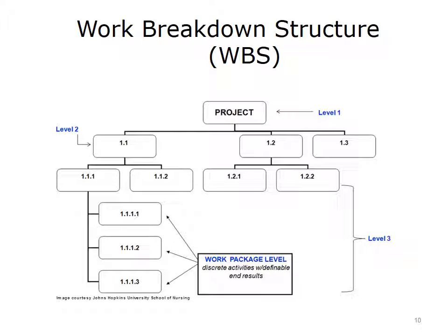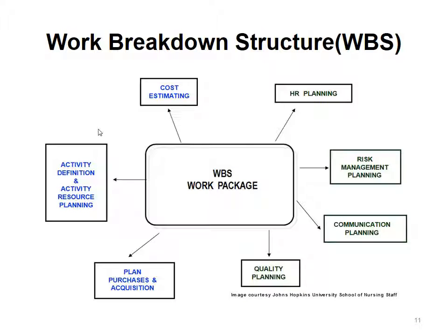The WBS is created by the project team on every project, regardless of the project size or complexity. It is a hierarchical, deliverable-oriented graphic image of the project scope. It provides the complete scope of the project in greater detail than the scope statement. The lowest level of the WBS is called a work package. Each work package contains a list of activities that can be estimated and completed. In this unit, we will focus on work package cost, schedule, and procurement.